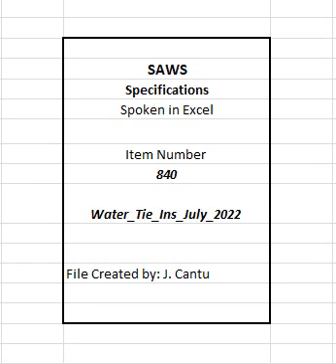The 25 calendar day period begins at written notification to the SAWS inspector and ends at initiation of the tie-in work. This will allow SAWS time to review shutdown options, coordinate with affected customers and engage with the public. Contractor should plan for the 25 calendar days in their project schedule and bid for every shutdown.